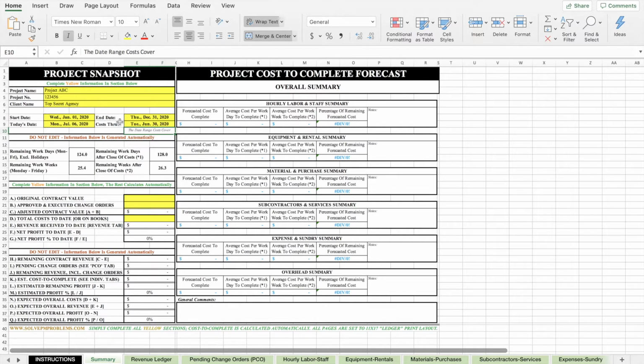In construction, it's typical for accounting and cost reports to be updated monthly, and if you do a projection like a cost to complete in the middle of the month, there's going to be a lag between what the costs on the books show versus the costs that you're actually going to be estimating based on today's date. So it's just important to capture that period there so as to not leave out costs from a couple of weeks between when the reports last show costs and where we're actually at on the project.